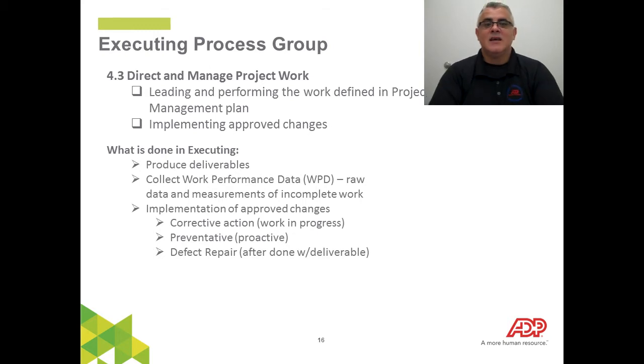Preventative is taking a step back and saying, hey, let's do this so just in case this happens, we don't have a problem. So your proactive approach, that's preventative. Defect repair is after you've already completed the work and you notice that it's a problem and you've got to go back and take care of it. So corrective action, preventative action, and defect repair are also taking place. Those are actionable things taking place in the executing phase of your project.